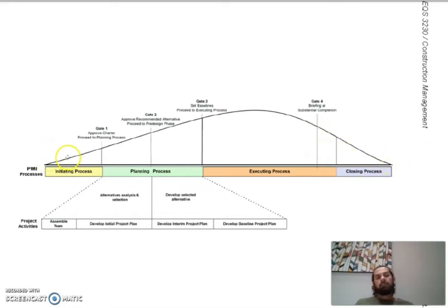And that is why, because the execution process or construction process needs most of the efforts to be here. Most of the efforts have to be here. It requires more power in this stage, which is the construction process. So you'll find the staff and other manpower, all of them deployed in the project at this stage.